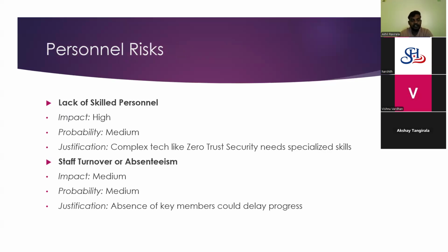Now, on to the personnel risks. These are often overlooked but critically important. A lack of skilled professionals poses a high impact risk, particularly when dealing with complex technologies such as zero trust security. Additionally, staff turnover or absenteeism can delay progress. The absence of key personnel during the critical phases can significantly hamper momentum and decision making.